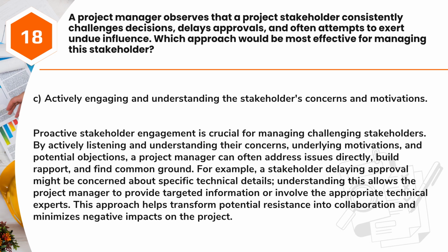For example, a stakeholder delaying approval might be concerned about specific technical details. Understanding this allows the project manager to provide targeted information or involve the appropriate technical experts. This approach helps transform potential resistance into collaboration and minimizes negative impacts on the project.